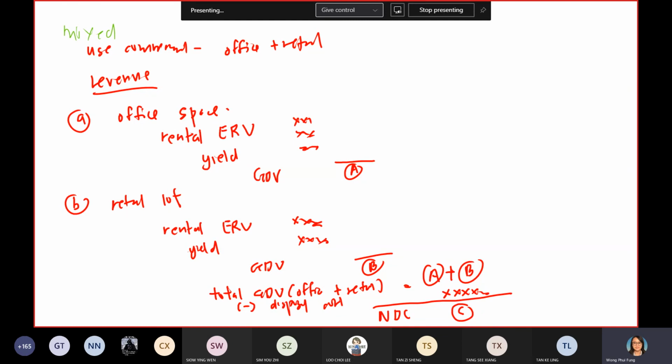Okay, I assume you ask assignment. So in order to get the price of the land, the cost, you use the residual method to calculate the cost. For your assignment, it is the residual method. So you use that method to calculate what is the land price.